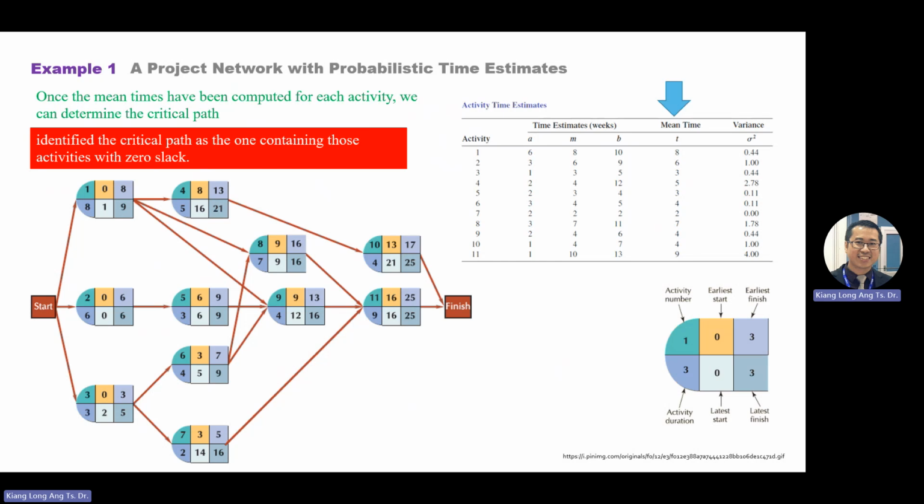Okay. Then this one you do forward pass, backward pass. This one is 5. So copy the number. So this one 2, this one 1. So this one got 2 and 1 to choose. So choose minimum. So this is 1, 0. Easier to check. Every time you do a question, you can do your self-check. Usually the first item, 0, 0. If you do backward pass and you do not get 0, something is wrong in your calculation. This is one of the final checks. And then careless mistakes will be here. The last one, like I mentioned on the whiteboard, choose the maximum numbers.